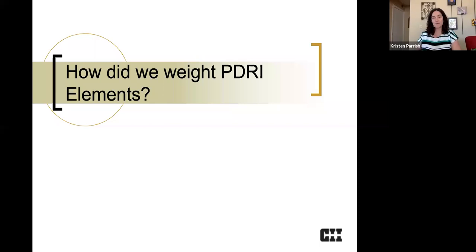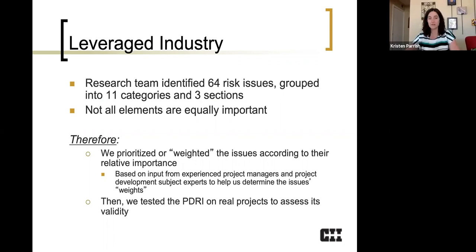So a lot of people are curious about how exactly we develop this because if you look, they might seem a little arbitrary. So the way that we did it, we leveraged all of you. We leveraged the industry. The research team, that was research team 155, identified these front-end scope risk issues, grouped them into 11 categories in three sections.